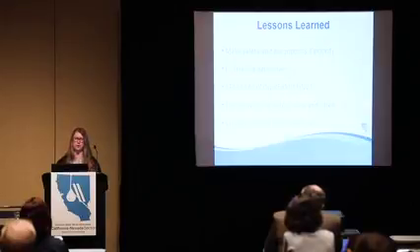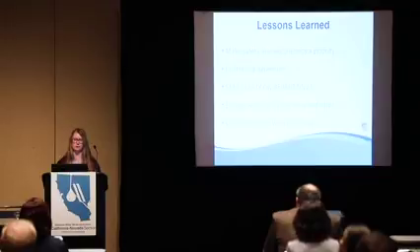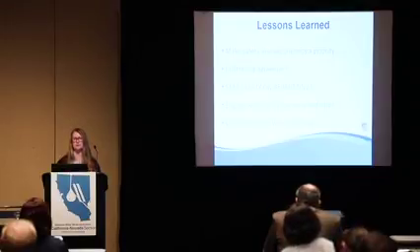We also started with a chartering agreement, which is a process where you bring all your internal teams together and you develop some agreements and a way that you're going to work together and establish goals and deadlines, and then have a commitment from the group to make sure that we're meeting all of those requirements. So I think that was also part of our success in being able to get these treatment systems online.